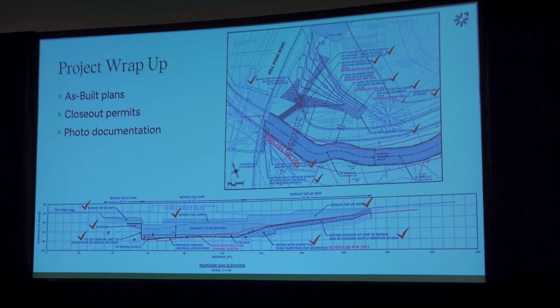And that goes alongside closing out the permits. There's typically some notification that the project's over. Here are the as-built plans. It's been completed as designed to finalize the permitting process, as well as some photo documentation, as we talked about with our pre-construction, taking your monitoring photos. It's nice to get them right after construction, see the site stabilize, so that next year when you come back, you can compare it to those photos immediately after construction.